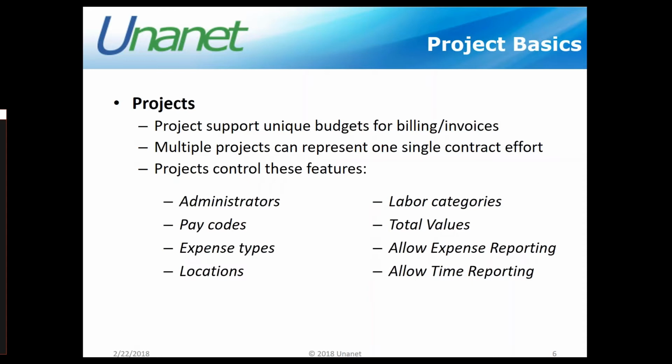So when you're trying to decide whether you should set your effort up as multiple projects or a single project with multiple tasks, keep in mind that projects lend themselves very nicely if you need to keep your budgets unique for billing and invoicing purposes. Okay, if you want to have multiple projects in the database that represent one single contracted effort, projects is a great way to do that, whereas tasks all pull themselves together under one particular project.